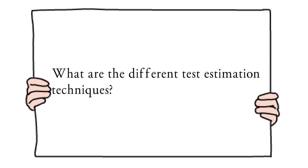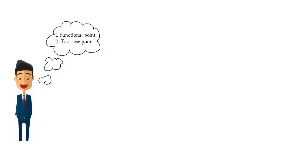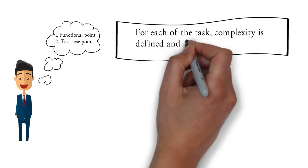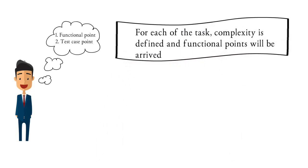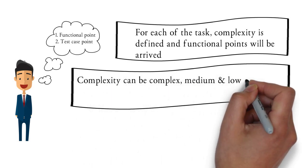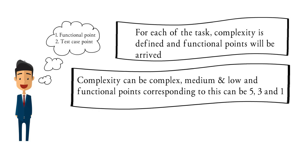Now let's see about the different estimation techniques used in the software testing industry. The two widely used estimation techniques are functional point analysis and test case point analysis. In functional point analysis, for each of the tasks, complexity is defined and functional points are arrived depending on how tough the task is. The complexities can be complex, medium, or low, and based on the complexity we assign functional points — 5 for complex, 3 for medium, and 1 for low.